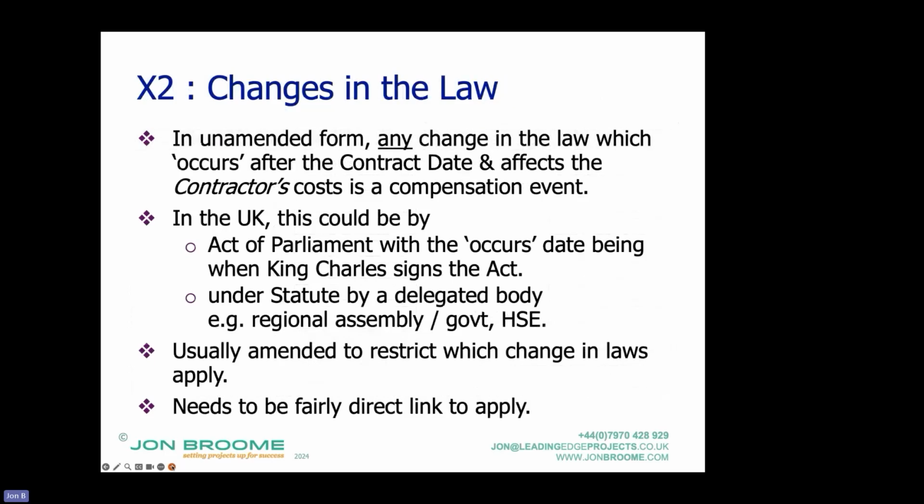Changes in the law is an additional compensation event, where any change in the law which occurs after the contract date and affects the contractor's costs becomes a compensation event. In the UK, this change in the law could be when an act of parliament is signed by King Charles. So it's not when the parliamentarians vote it in and say, we want this. It's when King Charles actually signs the act.